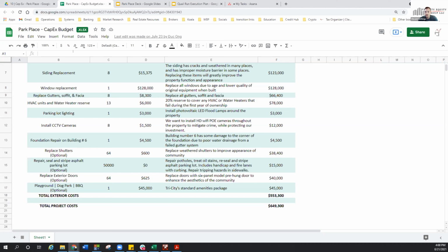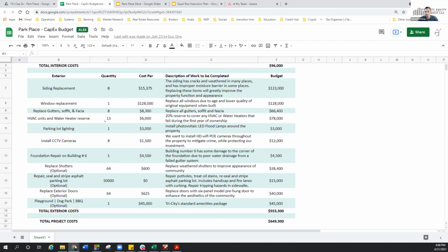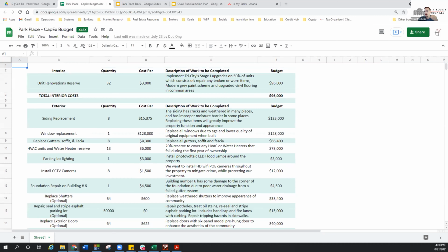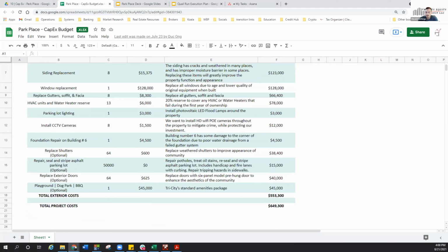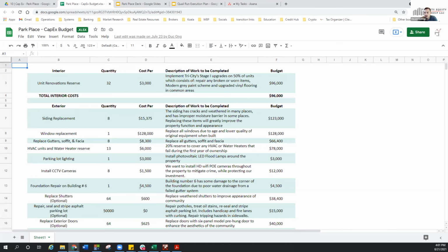Okay, and like, okay, well, if this dropped the returns to this, we need to see what we can expect rents to be or income to be if we're going to do all these CapEx, these capital expenditures. What can rents go up to, right? And then we're going to go check the comps and be like, okay, if we're going to reposition this C-class asset, this kind of shabby looking place, to compete with the best property in town, the best apartment complex in town, that's going to cost us $650,000 to reposition to be one of the best properties in the town. Okay, what's the rent difference between our rent and their rent?